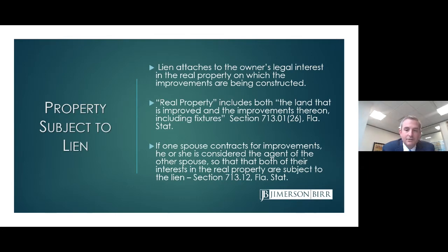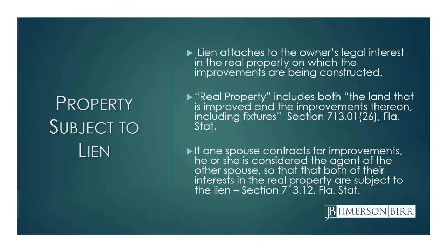There may be a breach of contract action between the owner and the contractor, but lienors are not going to be able to lien the real property if the party contracting for the work is not the owner of the real property. There are some nuances and potential exceptions to that under certain theories like agency or ratification, but it's important and key to understand that the party contracting with the contractor actually owns the real property.